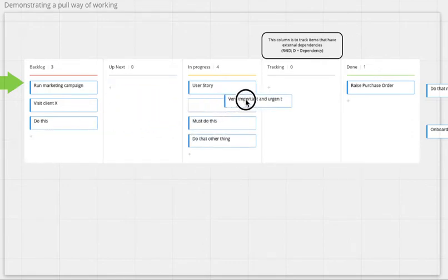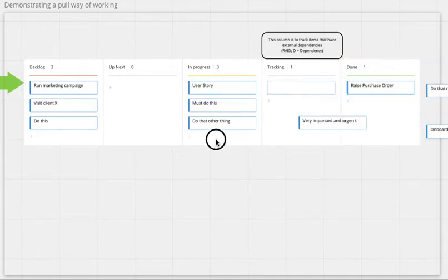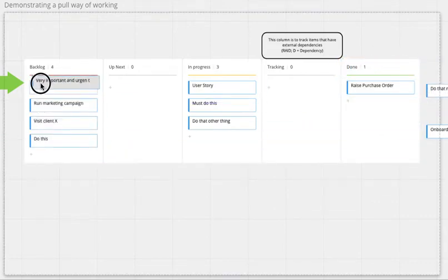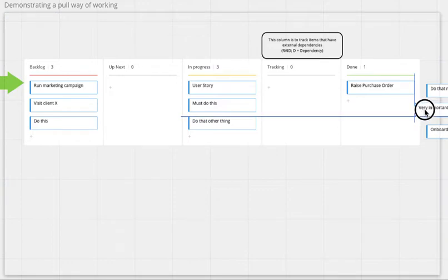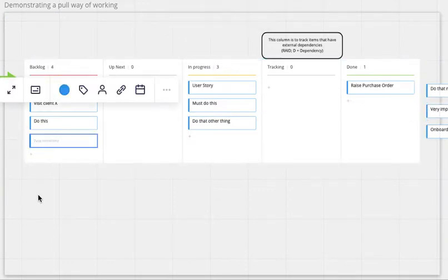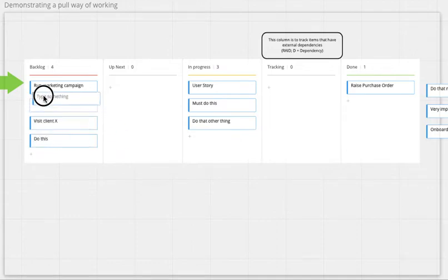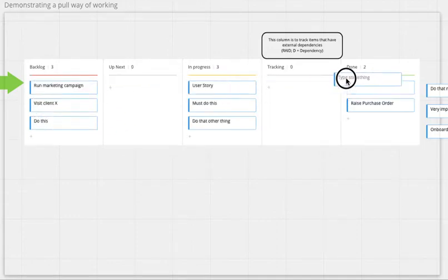you can measure it getting to the done column, or moving up this queue of work somehow and then going across into the done column. That's called lead time. From the time for a card to arrive, to a card making its way up to the most valuable thing, getting pulled into the system, getting pulled across the columns into the done column. That's called lead time. And you can measure this, and that gives you that predictability.